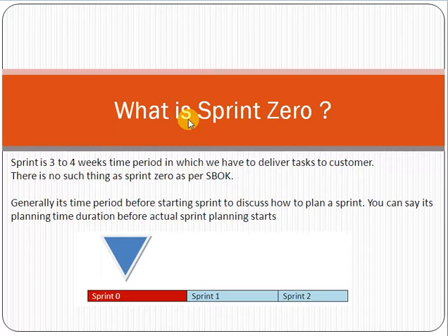The difference is that first you will complete the 10 tasks in a sprint, which is of 1 month, and you will showcase the work to the customer and get his feedback. So a sprint means around a 3 to 4 week time period in which you have to complete the tasks and showcase them to the customer. So this is the main concept of a sprint. Sprint is just a time period, a time frame of about 3 to 4 weeks.